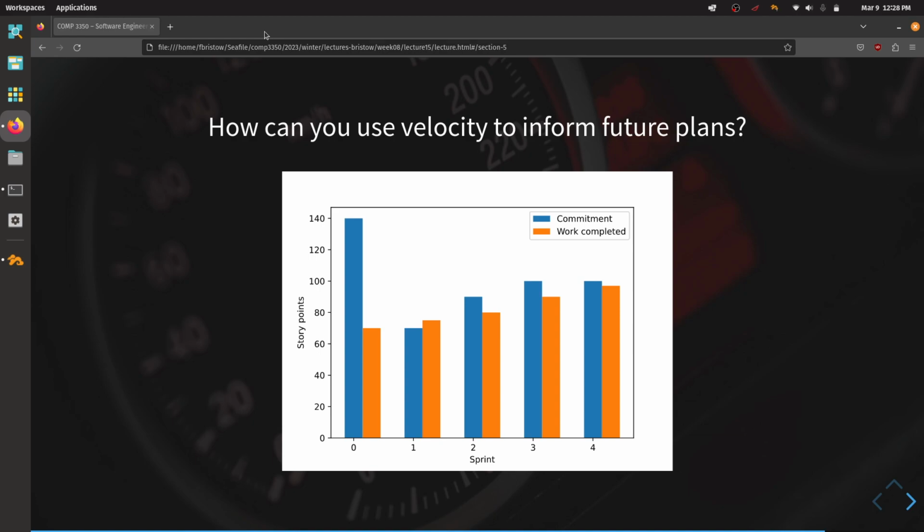It's reasonable to make increases as you become more familiar with the project, as you become more familiar with the product that you're trying to build, as you become more familiar with your team, the tools that you're using, the thing that you're actually trying to build. As you gain more familiarity and knowledge with this thing that you're working on, you can start to increase the amount of commitment that you're making because there's less work that goes into just figuring everything out. This is a good tool to help you plan going forward. So past iteration 3 and 4, going off into the future.